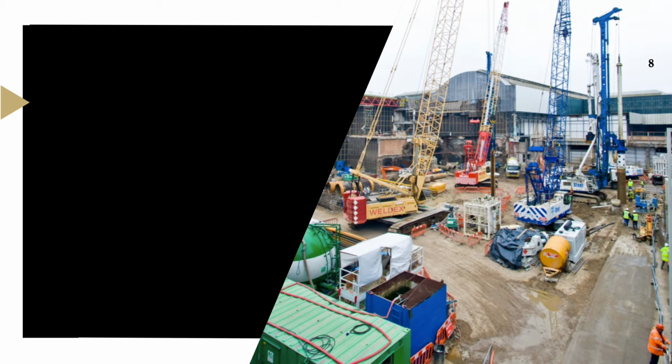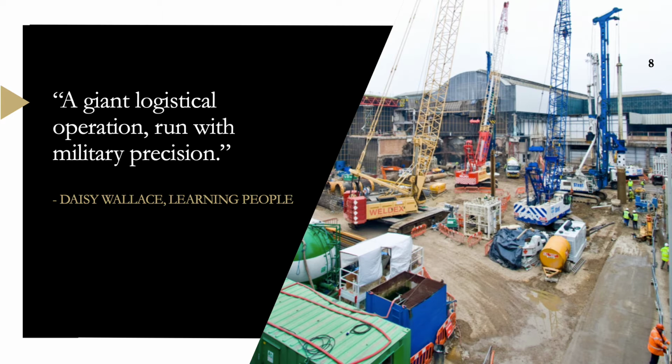The existing underreamed bored piles of the demolished Southwark Towers were insufficient to incorporate into the Shard foundations and too expensive and time-consuming to remove. The interplay of these multiple constraints created a giant logistical operation run with military precision.